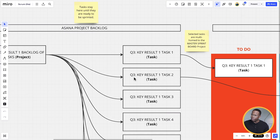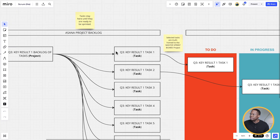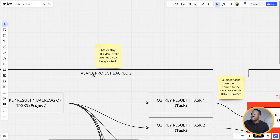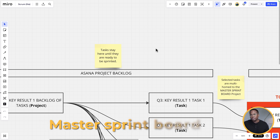Within that backlog project, we're going to have our different list of tasks. For this example I have eight tasks — Q3 key result one tasks, one through eight. What's important to note is that within the Asana project backlog, these tasks will stay here until it's time to sprint them. Each week we'll ask the individual to look through their list of tasks and assess what they feel they can complete in the next sprint cycle, and they'll move those tasks into our master sprint board.